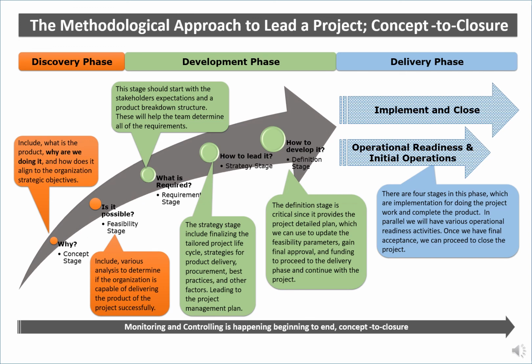In other words, once that idea is submitted and maybe goes through gate 1, control starts. Monitoring and control start, and will continue all the way to the end of the project until we formally close. In the CAMMP model, that is definitely all the way to the end, because we have gate 9 to prove and to verify that the project is indeed closed after making sure that all the closing requirements have been fulfilled.